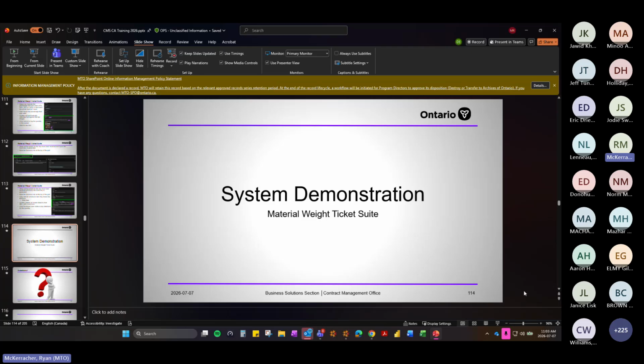What happens to the subcode quantity exceeded or lower than in the Q sheet when it's reconciled correctly? Does it sit in the system and do nothing? So if the material summary comes in higher than what the subcode quantity is or the tender quantity on the contract, it's not going to do anything other than QU to identify the need for a change order or an OPA or otherwise an investigation into why the quantities are so high. Maybe someone over excavated or something like that, and suddenly the quantities are higher than you expected. But the system's not going to stop you from doing anything functionally.